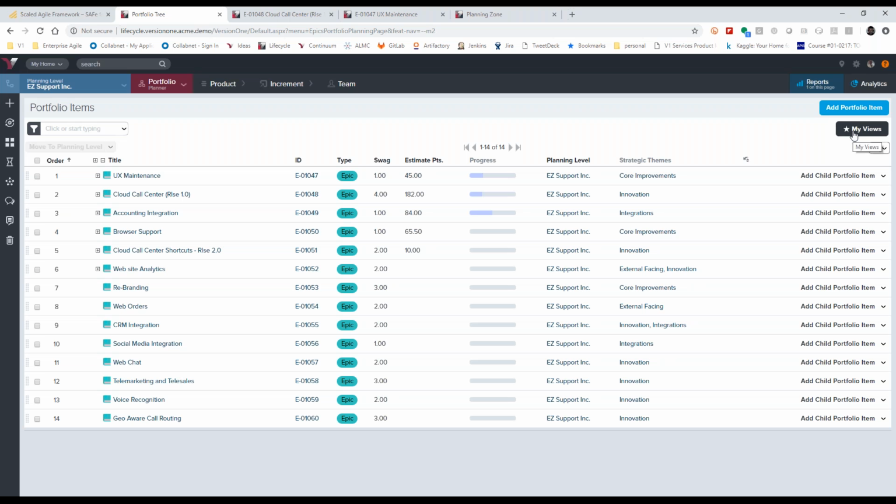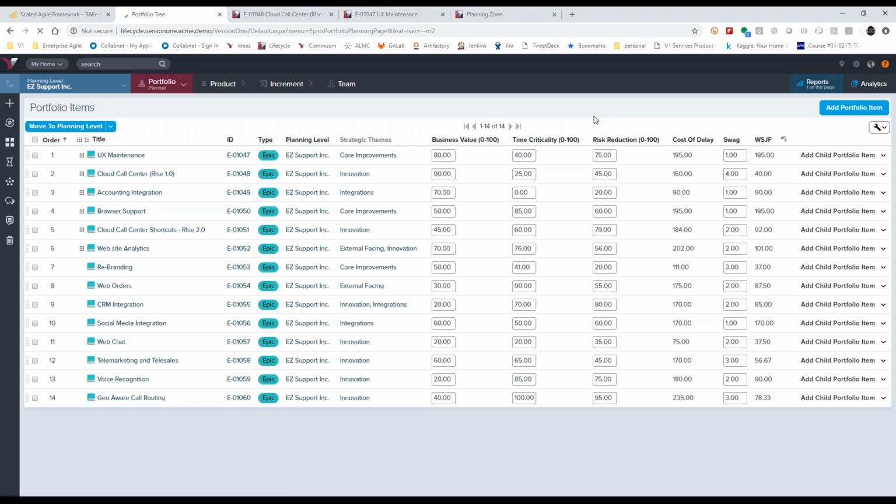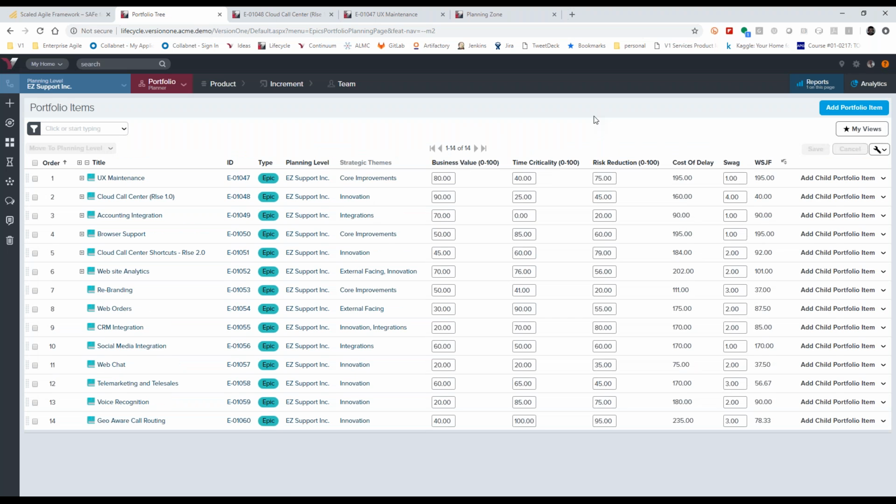An important aspect of this prioritization is to have some form of economic prioritization. So again, the Scaled Agile framework has some recommendations. Part of that includes defining or calculating a weighted shortest job first to help make some decisions around that priority, and pulling these into the different stages or phases of the organizational process we'll take a look at in the Kanban in just a moment. But this gives us a starting point for understanding what it is that we're going to do and what the priority of those items is, again, to communicate and align the rest of the organization to the execution of these.